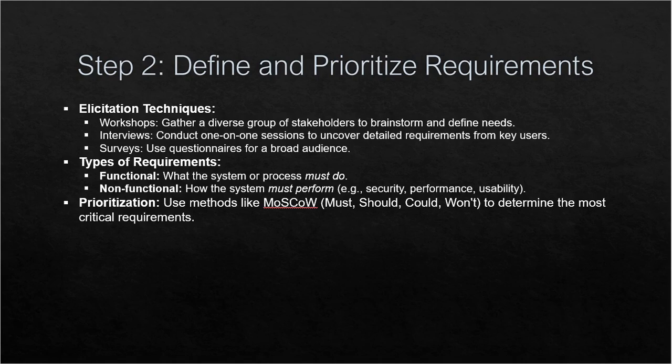We have a number of requirements that we collect with requirement elicitation techniques like workshops, interviews, surveys, group discussions, chat sessions and brainstorming sessions, gathering diverse stakeholders to define the needs of the business, and the current and to-be states. We also conduct one-on-one sessions with key users to uncover details, and survey questionnaires for a broader audience. Once we collect the requirements, if we have any open points, we mail those questions to the client and get their response. If needed, we also conduct document analysis.